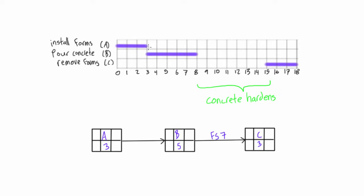All of these relationships that we've been learning up until now have been finish-to-start, and actually in the next video we'll talk about all of the different types of relationships. But for now, if you see FS7, that means once this one finishes you wait seven days till this guy can start, and that gives us our FS7.